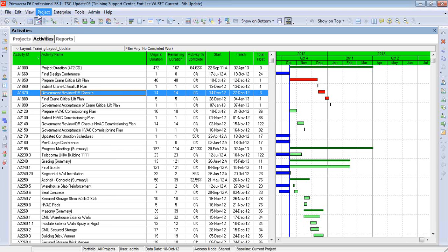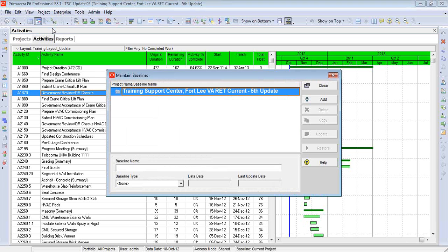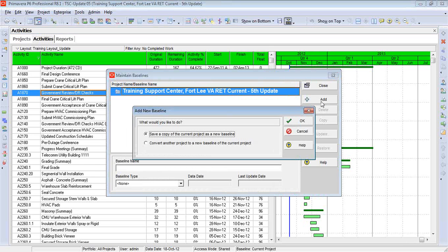To do that, we go up to Project, Maintain Baseline, and then you click on Add. Now what we're going to look at right now is making a copy of the current schedule and making it a baseline — a perfect copy of the current schedule.